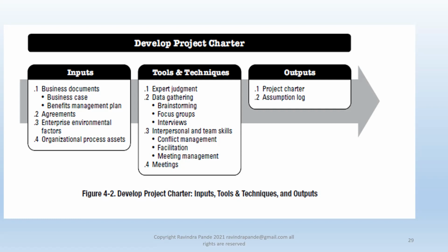And we normally try to address these risks with a score, impact analysis, cost analysis, and a person responsible for addressing those risks. In case something is not going as per the plan, this responsible person might escalate it to the project manager or any other relevant team, so that the risk has to be mitigated, or audited and reviewed again, so that we don't disturb our plan for executing this project, solution, support, services, whatever you're developing, enhancing, creating, and so on and so forth.